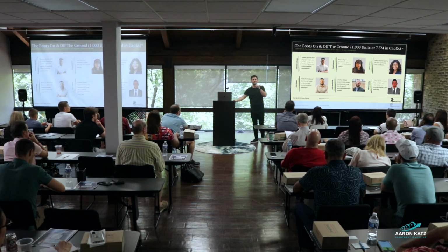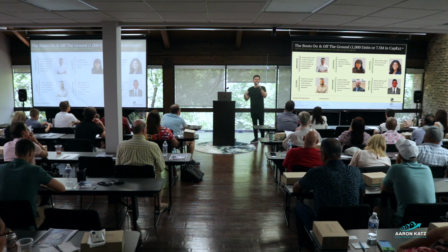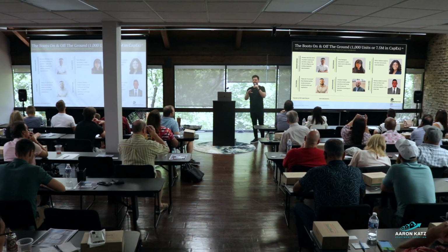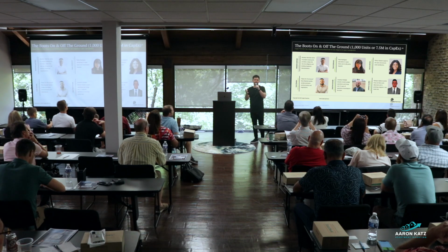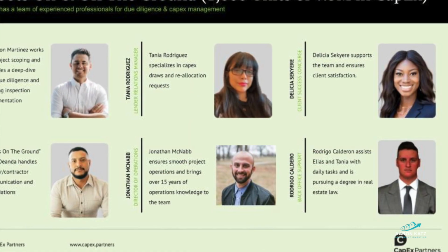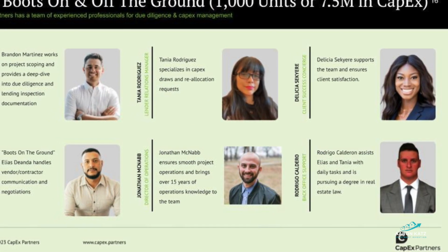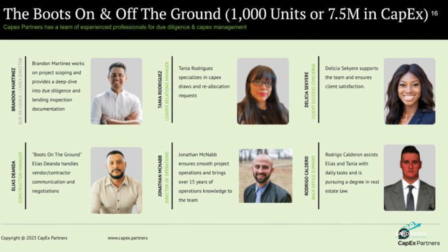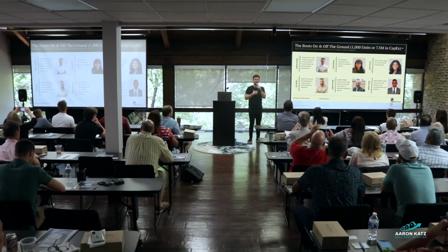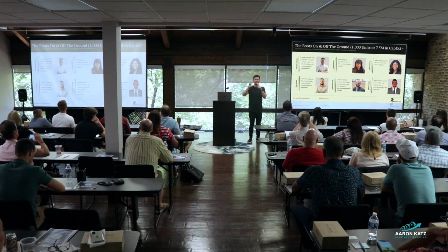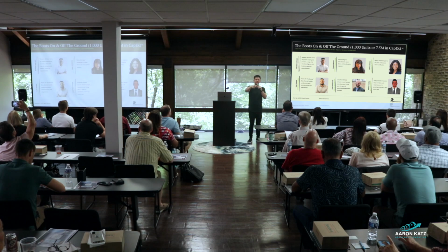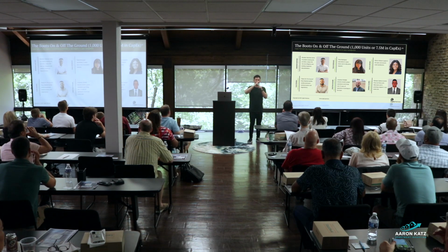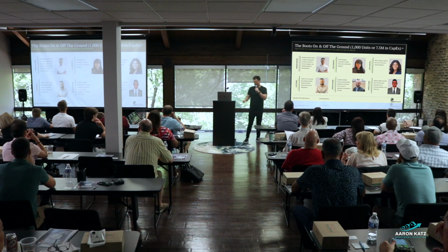The only reason I put this up here is because if anybody's wondering what it takes to manage, let's say, 1,000 units of CapEx, I'd say it's about 6 people. So if you're like, can I do this by myself? I did do that by myself for many years, and looking back, it was probably not a good idea. I was running all over the place. But when you get to 4, 5, 6 properties that you're managing CapEx for, you definitely want at least 6 people. And if y'all want to talk about it later, I'll go into what those positions are.